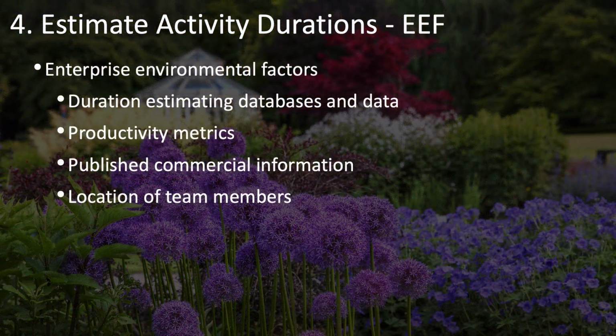Let's start with the list of enterprise environmental factors that can influence estimate activity durations. First of all, you may be fortunate enough in your organization to have some databases and other data in your organization about durations of activities of previous projects. And if these are activities that are similar, you may be able to use this information to guide your estimates of the activity durations for your project.